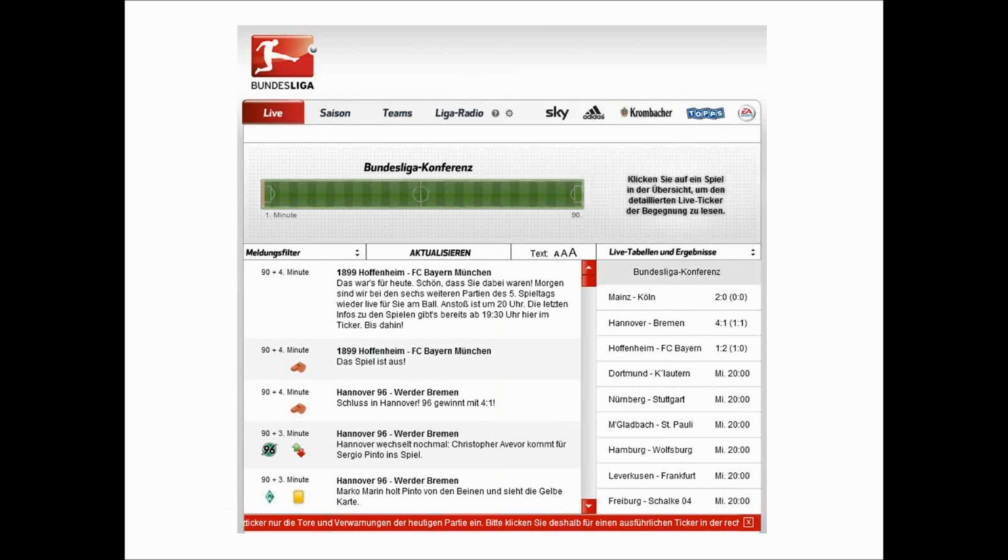And then what you try to do is put your last iteration or your last project phase into 90 minutes of a soccer game. So you're building up a ticker. You write down something like, in the 12th minute we lost one player, or there was a foul in the 56th minute by the other team, or we had some late goals in the 89th minute, which could mean that you have some late features finished at the end of the sprint.